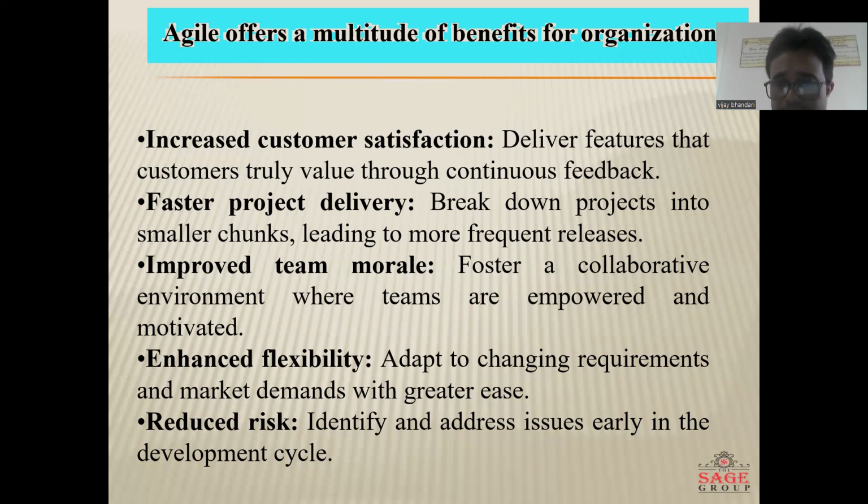Agile development, we can say, involves a high degree of collaboration and communication among team members, as well as the willingness to adapt to changing requirements and feedback from the customers. In the agile model, the requirements are decomposed into many small parts that can be incrementally developed. The agile model adopts iterative development, and each incremental part is developed over an iteration.